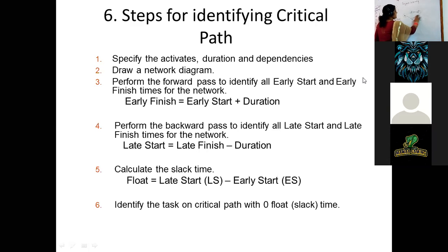So we can have this F here so that we can club these activities. F is dependent on E and G is dependent on E and D. There is another activity G. And this H activity, this is dependent on F and G. So it will be F, G, and we'll have H here.